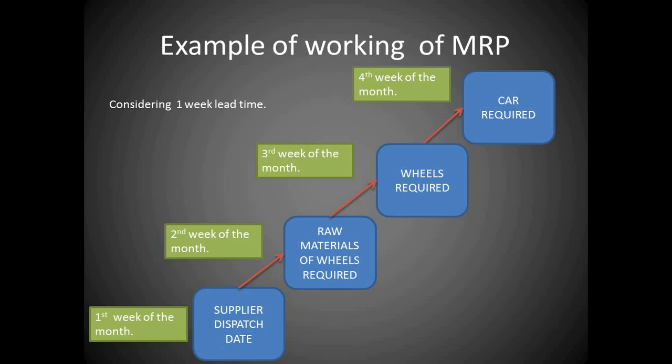And then wheels required should be by third week of the month. The raw materials which are required for the wheels should be within the production place by second week of the month. And therefore, the supplier has to dispatch the particular raw material which is required for wheels to be assembled in the first week. That depends upon lead time.